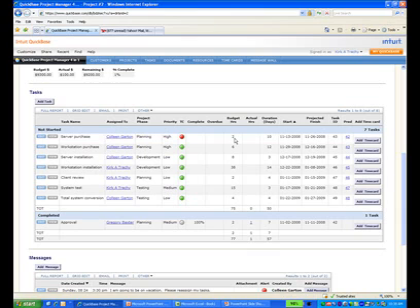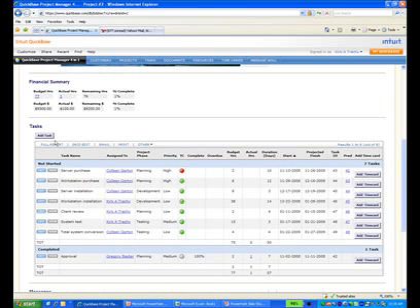This one happens to now have resolution of hours. Not only are you assigned it in days, but hours too. Colleen is assigned that. If you think about it, we can total up all these hours and get an idea of what this is going to cost, both in hours, but also what their cost to the company is. If you've got a number of different projects you're considering, it's great to know what the impact to the company is, the load on your workforce is, and this can do that.